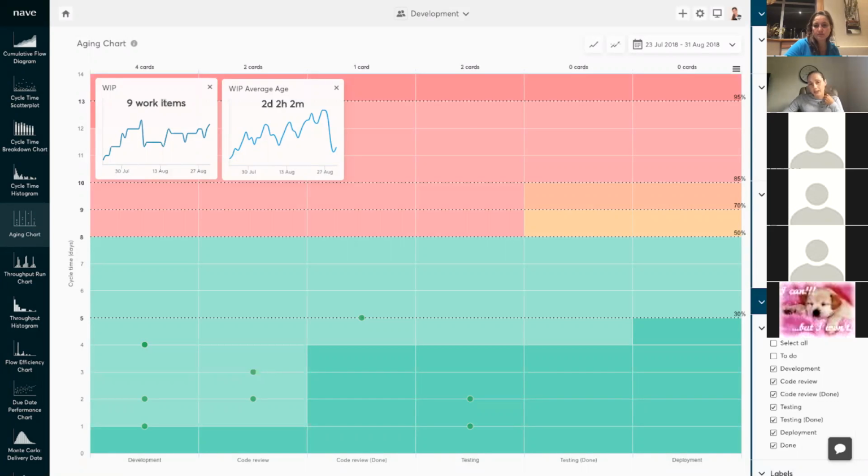I have been talking about stable systems for a while now. According to Little's law, maintaining a stable system depends on two main factors: your work in progress and your average age of work in progress. For these two metrics, the key is consistency. Stable systems are determined by keeping both your WIP and the average age of your WIP consistent. And the more stable your delivery workflow is, the more predictable it becomes. The average age of WIP and cycle time.